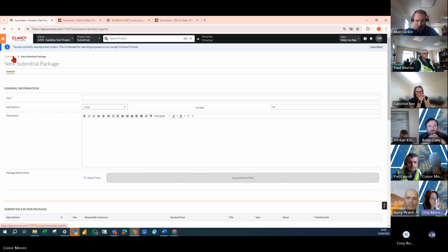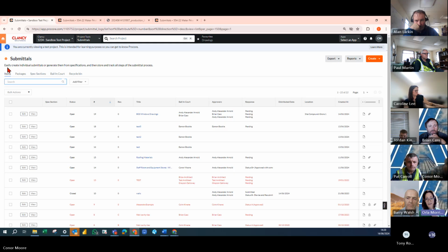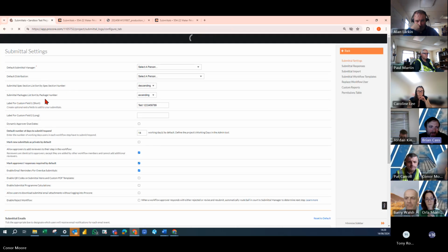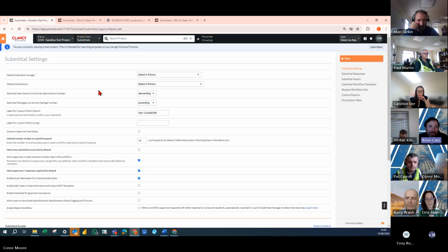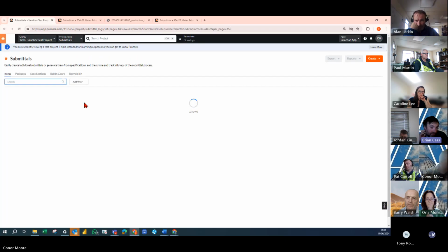And the procedure to go along with it is PRCM 26, the technical submittal procedure. It doesn't go into the detail Connor just went into, but it's the overall procedure for managing technical submittals. And I think the responses can vary from job to job in terms of status A, B, and C. Some design teams like that a bit more refined, some don't. So that can be changed in the back end, but you're probably better off touching base with Connor on that when that situation arises.